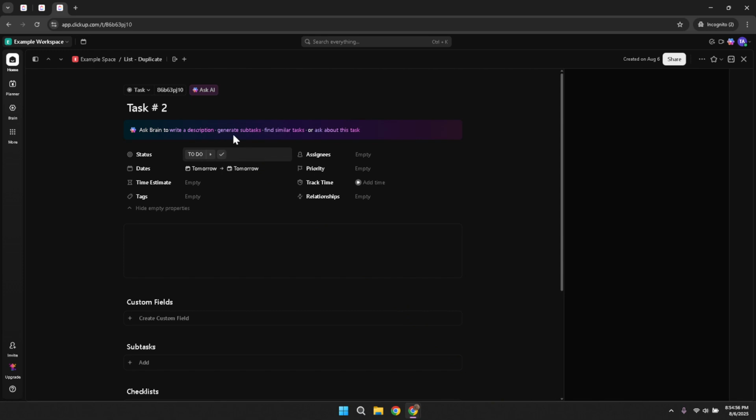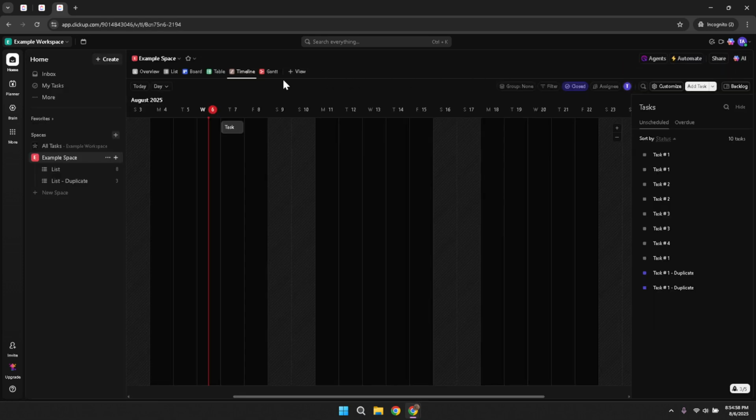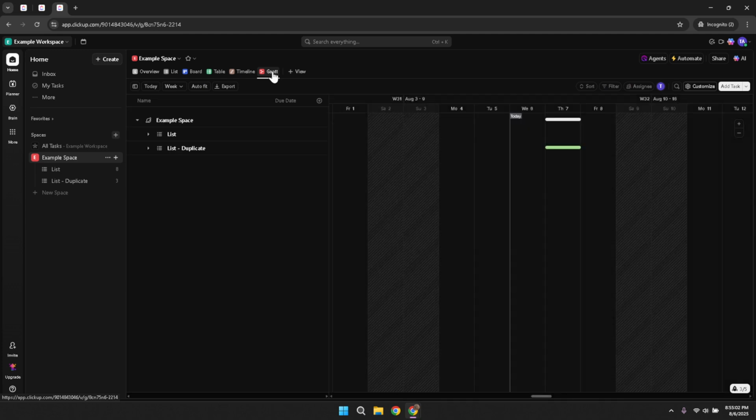Next, we're switching to the Gantt view. Again, navigate to the same panel and select the Gantt chart option. The Gantt chart is more intricate and best for detailed planning. What makes it unique is how it illustrates task dependencies and progress over time in a way that's both detailed and visually appealing. You'll notice lines connecting tasks, showing their dependencies, which help you strategize and understand which tasks must be completed for others to begin.